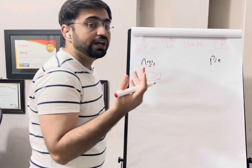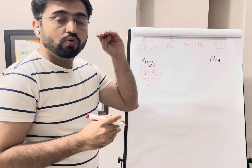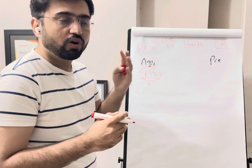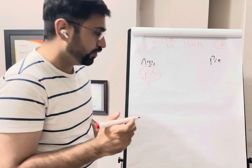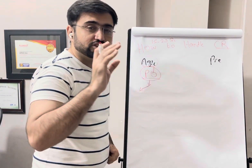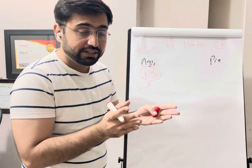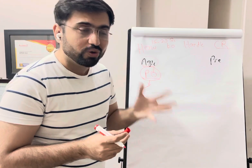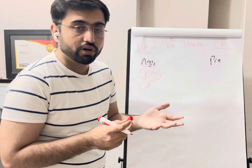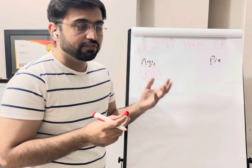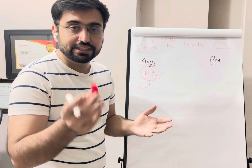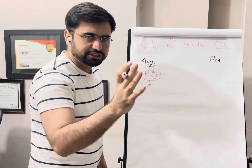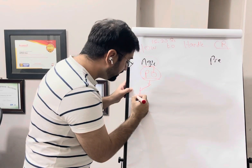Whether the change is requested to the development team or the scrum master, whoever receives it, the change goes to the product owner. The product owner evaluates the change: what is the value — very high value, high risk, medium value, or low value? If the change is so important that it can make the current sprint obsolete — meaning if you don't do it, the work becomes useless — the product owner can add that change into the current sprint in collaboration with the team.